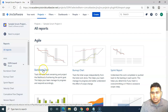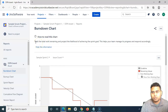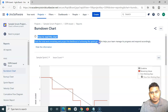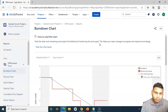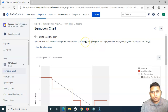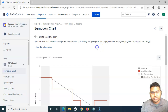If I click on the burndown chart, this is the agile report burndown chart. Reading the description: it tracks the total work remaining and projects the likelihood of achieving the sprint goal. This is relevant to your sprint, which is an iteration of two to four weeks. This chart helps you visualize whether the work progressing within the sprint will likely be achieved or whether you will miss the goal. It helps the team manage progress and respond accordingly, and there are many key aspects you can identify from this chart.